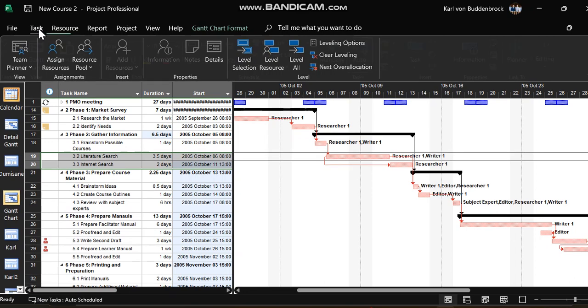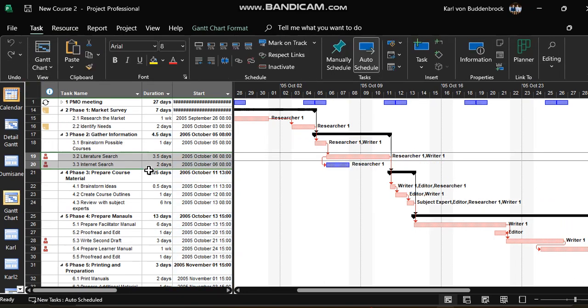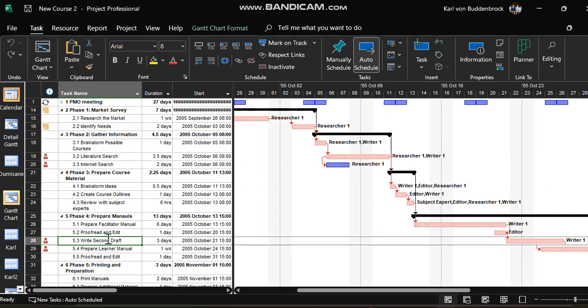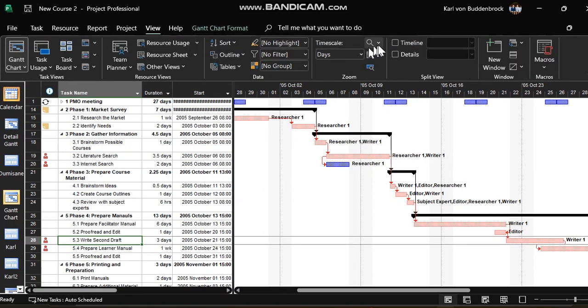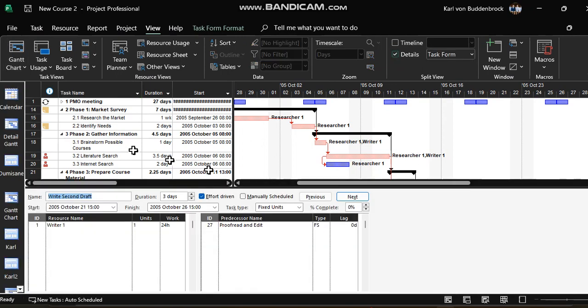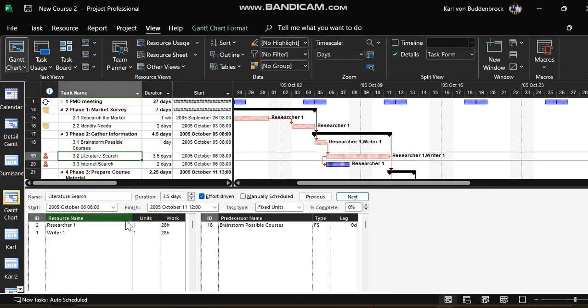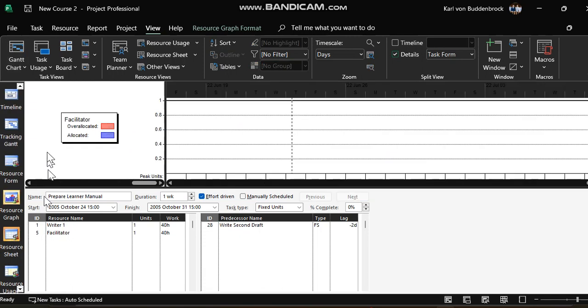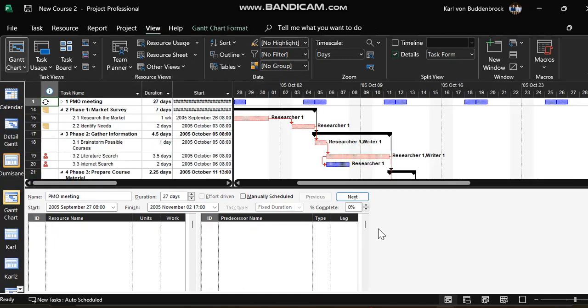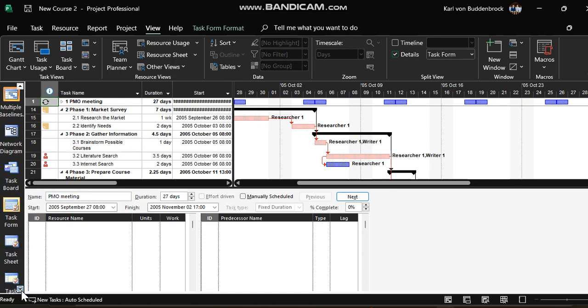Once again, guys, just to show you how I see the problem, and I know this is MS Project, but this will pertain to project management in general. How do I see the problem? The best way to see the problem is to split the screen into details on the bottom, to then select the resource, the over allocated selection, and then to activate your resource graph. Okay, there's your resource graph. No, sorry, big mistake. I always tell my delegates, activate the bottom screen first. Okay, so let's activate the bottom screen first, and now change the bottom screen to the resource graph.